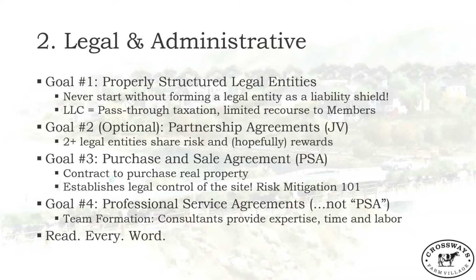And Moneybags is going to provide 5% of the capital that's needed to secure a development loan. That development loan is going to be necessary to obtain the construction costs that we need. So Moneybags gives up 5%. You're going to contribute 5% equity. And then the Puttergills have agreed to commit that third of their land where the project's going to sit as security against that development loan. And the bank is going to value that land. After they've done the appraisal, let's just say that the land is worth 15%. So 15 plus 5 plus 5, 25% equity that's ready to go into this project, 25% of what you think the overall cost will be.